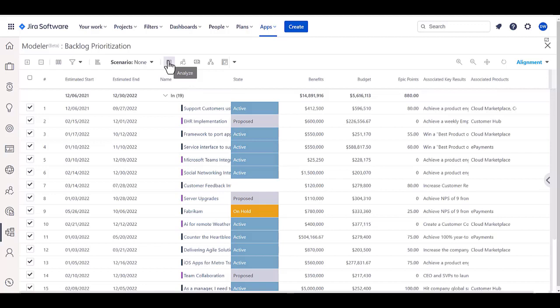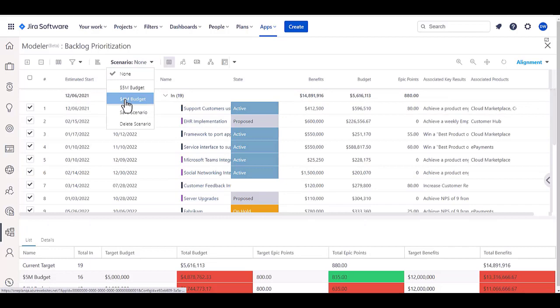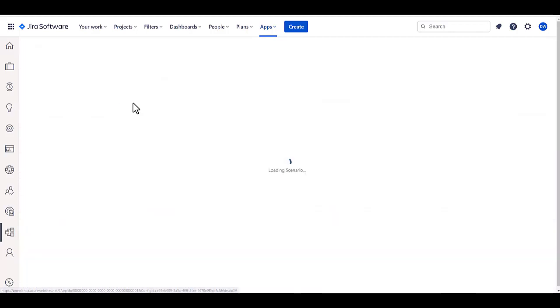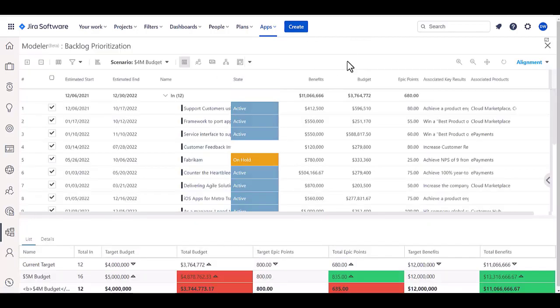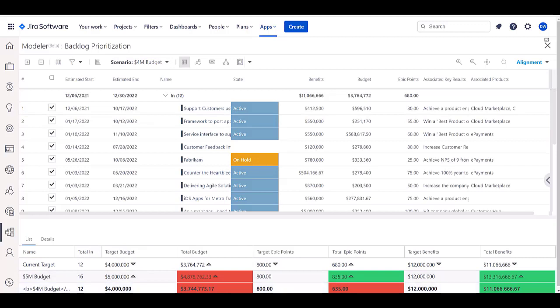So, for example, if I came in and looked at a scenario of a four million dollar budget, and if I have a look at all these potential projects and active projects and say, within that four million dollar budget, what can I do? And then look at the current targets and what that four million dollar budget would let me do.